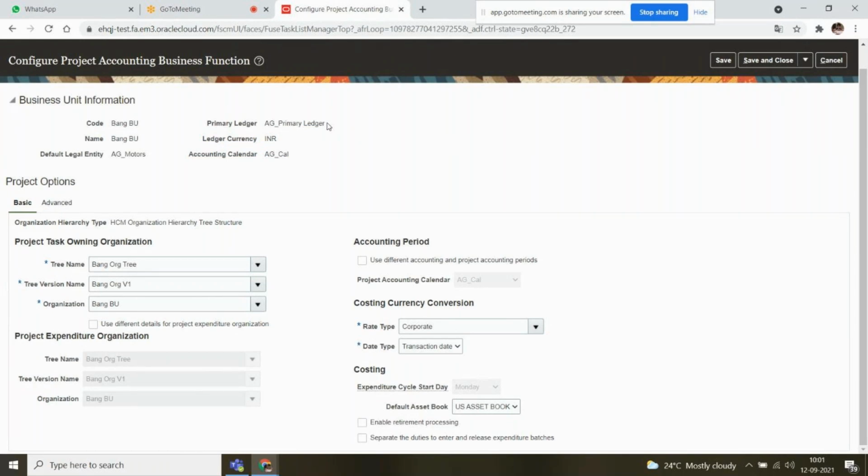So in that case, while creating a project type itself, you have to enable both billing and capitalizable options. Then whatever asset you are having, you can even sell it. My question here is, I actually started as a capital project and didn't enable any billing related activities. Then in that case, you have to transfer your cost to the contract project, right? That is your only option here.